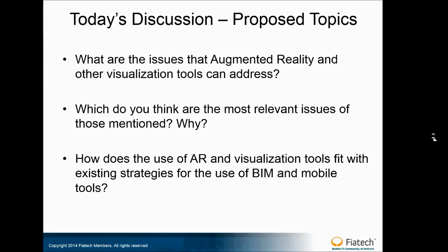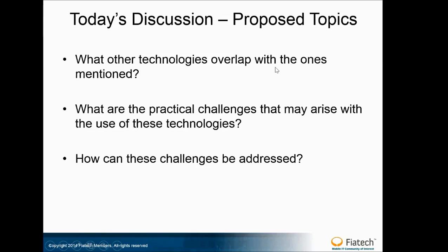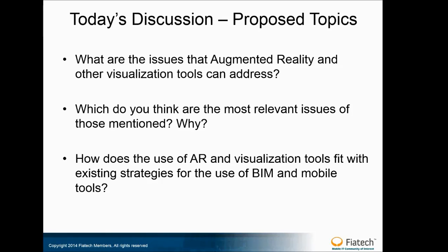I think the discussion on the accuracy is very relevant, and I'm really glad that Stephen brought up the importance of the use case. I think there's a number of things when it comes to accuracy. One is how accurately we can track the location of the user in 3D space. The second question is how accurately we can overlay 3D CAD/BIM information on the field of view of the user. And the third one is whether we would like to use this sort of augmented image for any sort of performance monitoring purpose, whether that happens to be quality monitoring or progress monitoring. Obviously, based on the use case, the level of accuracy that will be needed is different. In the context of what we've been discussing mainly so far, it's been access to information, so the accuracy will be more on tracking the location of the user and being able to accurately overlay beam information on the image. So obviously this could be defined in different use cases.